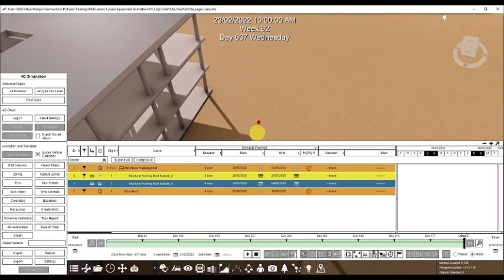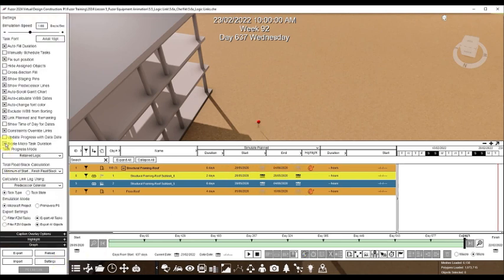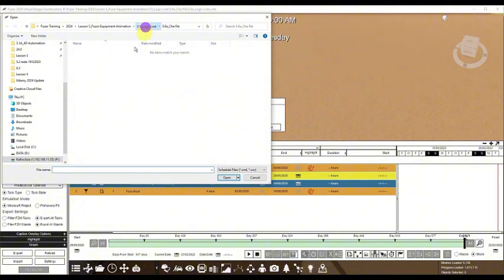This section explains the effects of schedule updates on microtasks. First, take note of the dates for the macrotasks as well as the microtasks. Turning on the scale microtask duration will adjust the microtasks so the start and end dates span within the duration of the macrotasks. Import the v2.xml under the folder 5.6b_updated schedule.